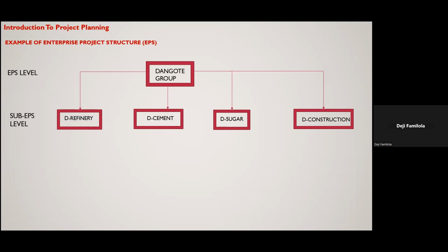So that needs to be communicated to me as a planner. I need to input it and run the software to see the impact it's going to have. And based on that impact, I can advise the team on what happens if John should go on holiday, because John has got a special skill set that nobody can replace.